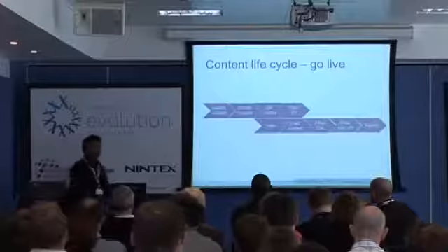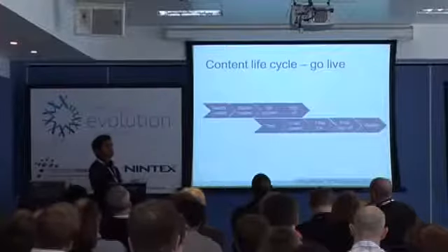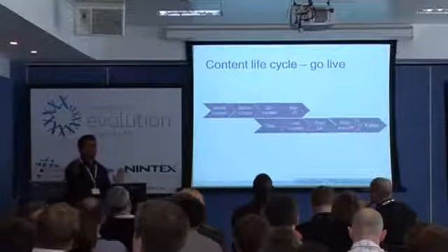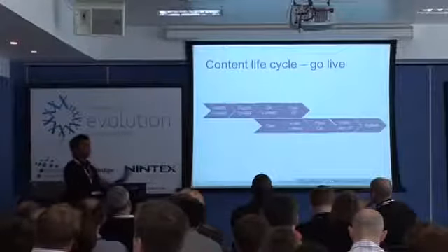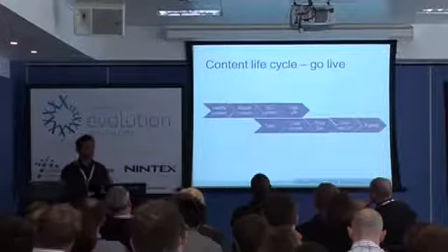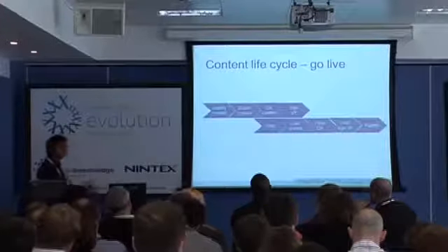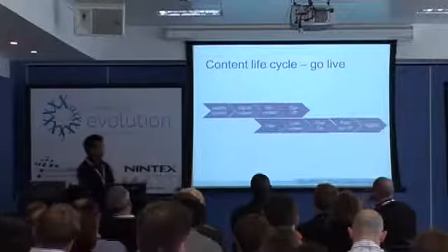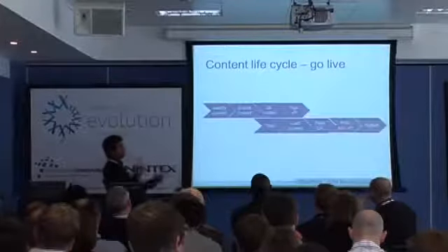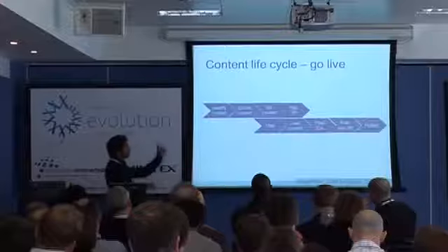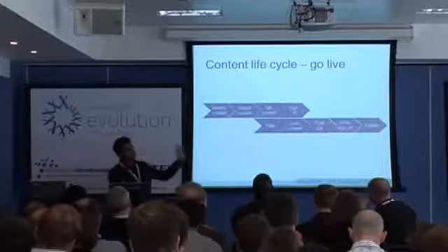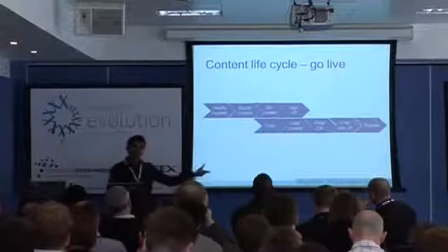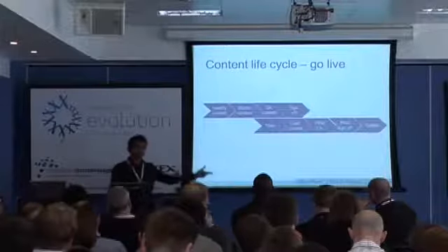So for go live, the life cycle of content was, because they didn't have an intranet, they didn't have a concept of what content should go there. So there was a lot of work involved in getting content ready. What we did was we identified content and submitted the content, basically all done using Word documents. Then we QA'd the content, and at the same time, a parallel work stream started on training the 85 content authors and owners to get the content inputted.